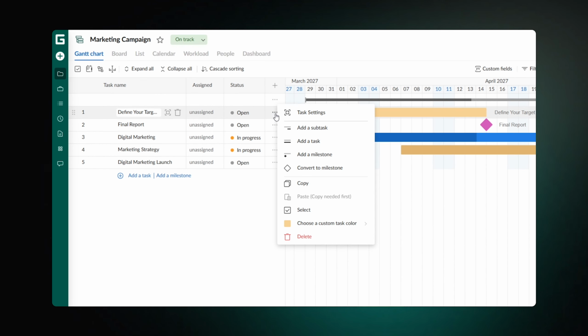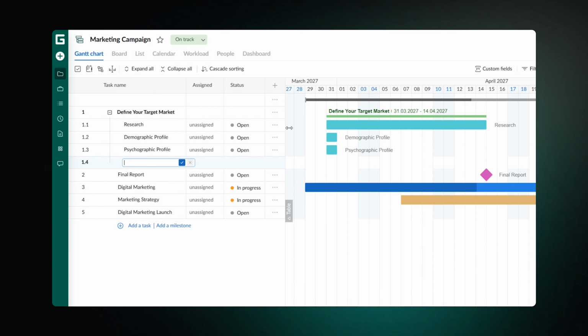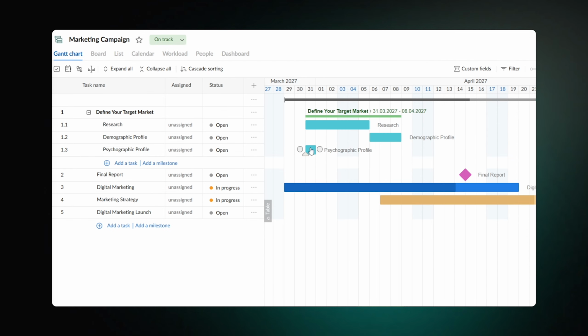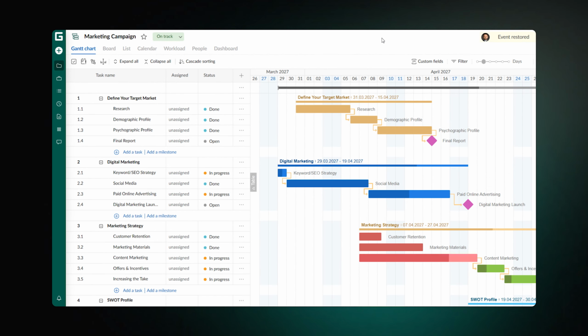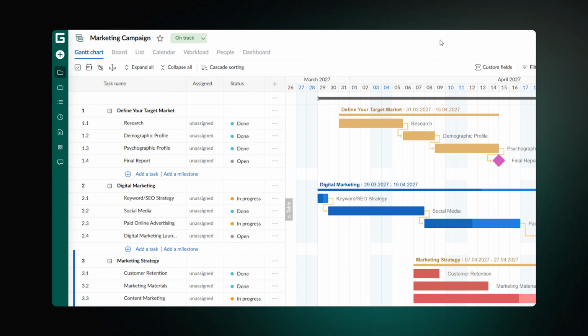After this, it's time to add another level of the hierarchy to consider details. Project tasks should be organized into sections. One team member or a small team will be able to easily manage them. The ID numbers on the left show the level of a particular task in the overall hierarchy.